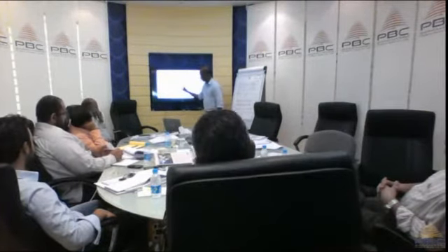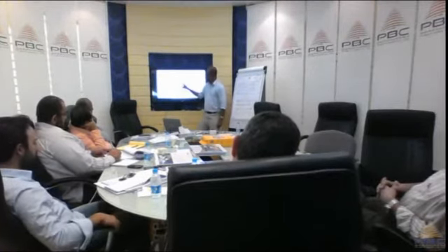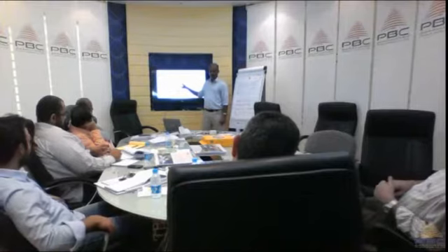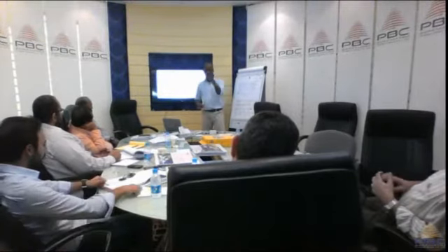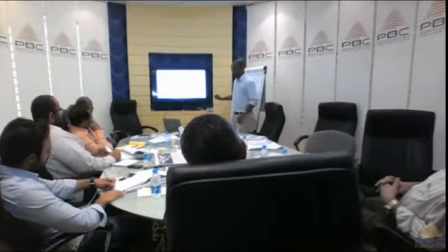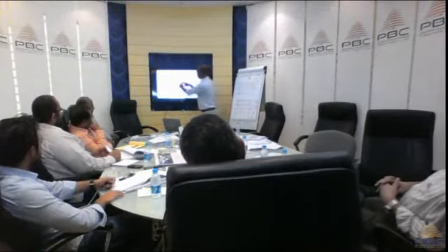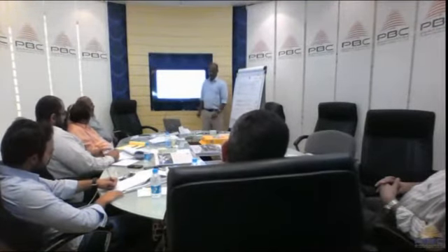Now, if my actual cost is here, above my PV, or above the earned value, what's happening in this project in terms of cost and in terms of schedule? We are overspending. Why? Because the actual cost is more than the budget, exceeding the budget. What about schedule wise? Schedule wise is okay.